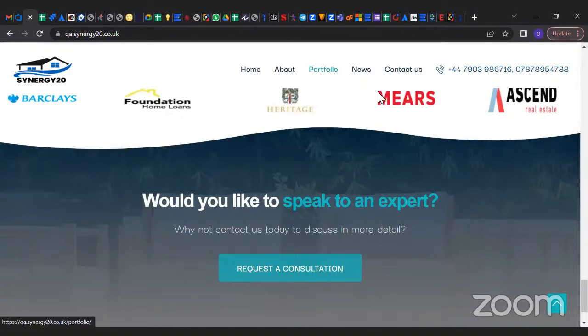So the sprint review has ended and we've gotten the feedback. The PO has already gotten the feedback, so we'll proceed with that in the next sprint. So we are having a sprint retro now. Just to put this in, the stakeholders won't be present during the retro. We just have the PO and the Scrum team. So now we want to start the retro.